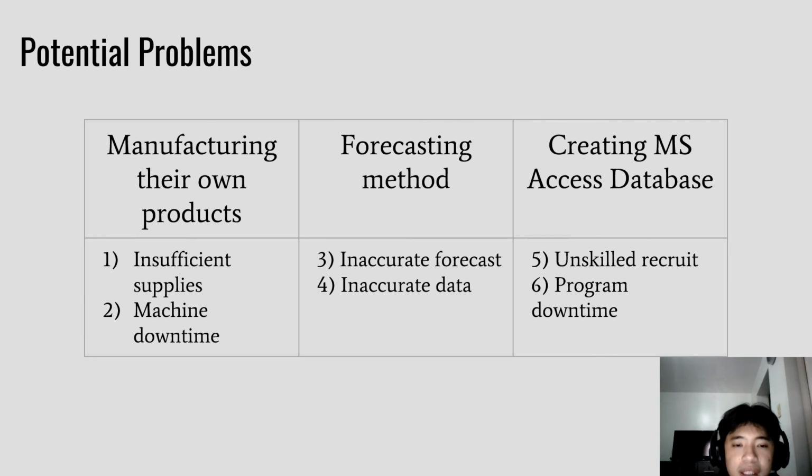The potential impact if this risk occurs is that the production of the products will be delayed. The likelihood is 4 and severity is also 4, and the risk score will be 16. To prevent, inspect machines daily after every shift. But the corrective way is to buy a new machine instead of fixing it every time. The third is the inaccurate forecast.